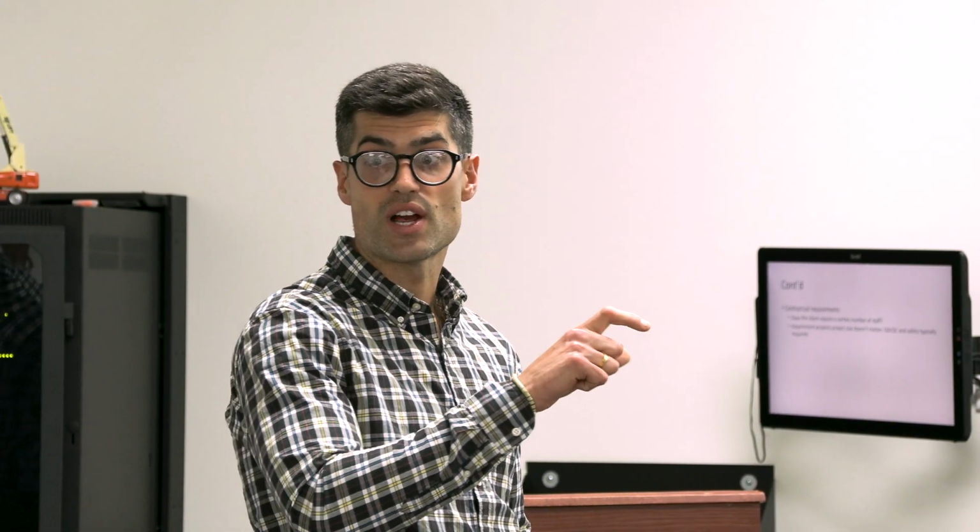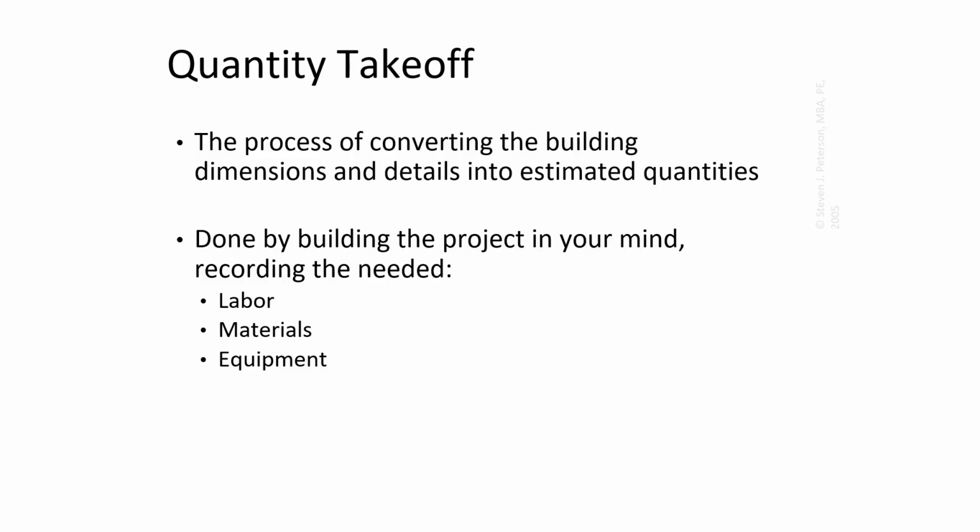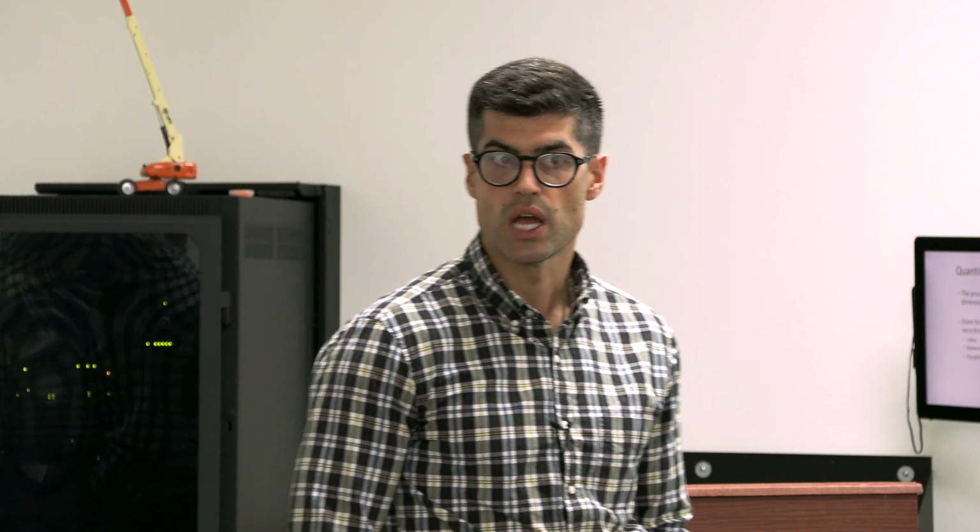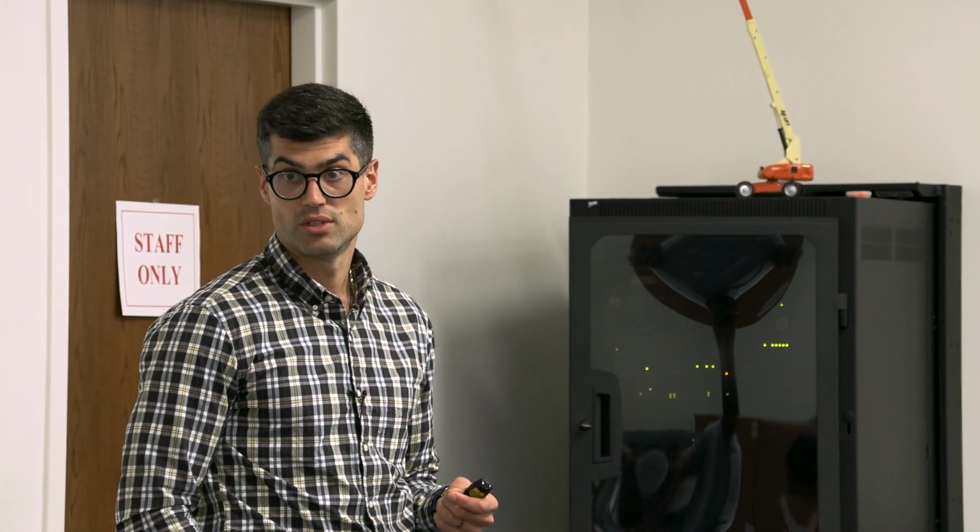Because a lot of times the contract is going to stipulate minimum requirements, and you've got to make sure that that person does. Okay, so now we've determined what the scope of work is, what the project is. Now we really get into quantity takeoffs. A lot of times this is just evaluating the quantity takeoffs of our subcontractors, or producing the quantity takeoffs ourselves, or checking the work. From a PM standpoint, of course I'm going to check the overall number, but I'll spot check things. I'll spot check things that are really important and on the critical path, right?